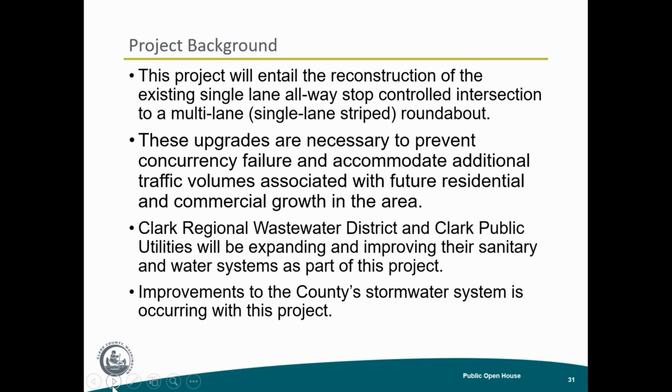One of the other things we're doing, while we have the ground torn up, is making sure that we give Clark Regional Wastewater District and Clark Public Utilities the opportunity to put in whatever pipe work they need to. That doesn't necessarily mean that there would be sewer at this time, but we want to make sure that the pipes are in the ground so that as they move forward with their systems, they have the dry pipes in the ground and can just connect to them rather than coming back in and digging up what we just put in place.